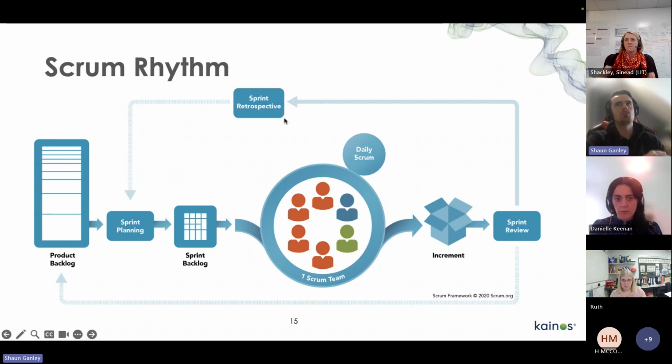So that's where the team looks back on how they think they've got on in this sprint and make any changes. So for me, I like to focus on what's really slowing the team down in making progress this week. So is there maybe a breakdown in communication? Are people not picking tickets up to test or review quickly enough? Is there a bottleneck with you guys as the client for reviewing what the guys have been delivering? Anything like that can come back from the retrospective, and that's really designed to improve the efficiency going forward.